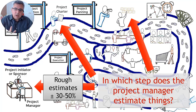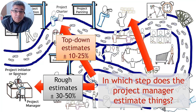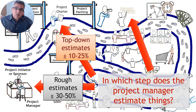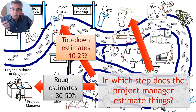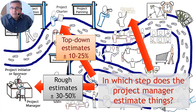It's important to always tell customers: 'I am giving you a rough estimate. Once we get more details, we'll be adjusting that through the process.' When you go for the project charter, you are sitting with the stakeholders who can provide a better understanding of the tasks — both those listing requirements and those executing the project. There is still some variation, but in one company I worked at, up to 20% variation after the project charter was acceptable.